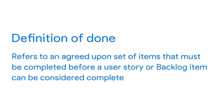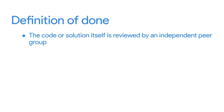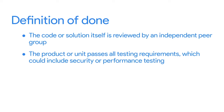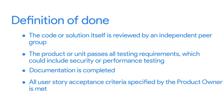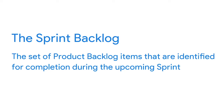Definition of done refers to an agreed-upon set of items that must be completed before a user story or backlog item can be considered complete. This may include: the code or solution is reviewed by an independent peer group; the product passes all testing requirements including security or performance testing; documentation is completed; all user story acceptance criteria specified by the product owner is met; and the product owner accepts the user story. The team should determine what belongs on this list and improve it as needed. A key deliverable of sprint planning is the sprint backlog — the set of product backlog items identified for completion during the upcoming sprint.